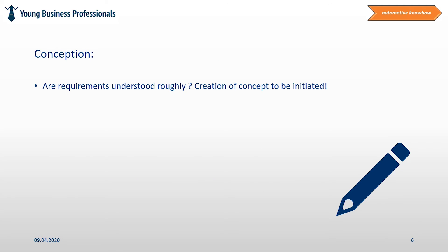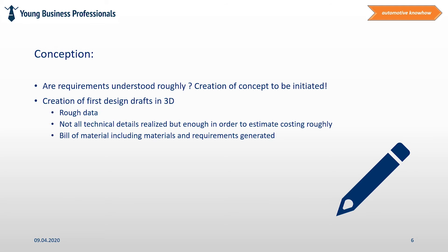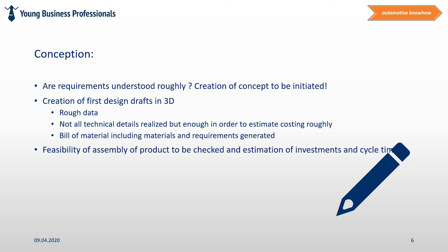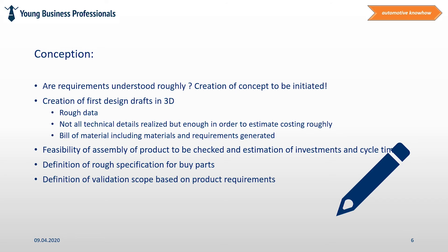Once all requirements are understood, the team can start to work on a first design concept. 3D files are created that are not yet showing all technical details but are enough to identify product cost roughly. In addition, a bill of material including material selection according to the customer specification is useful. Based on the bill of material, the whole assembly process is drafted in a superficial manner in order to estimate cycle times and investments to industrialize the product. Moreover, purchased components will be prepared to RFQ them preliminary at sub-suppliers, and a preliminary validation scope is defined based on the identified product requirements.